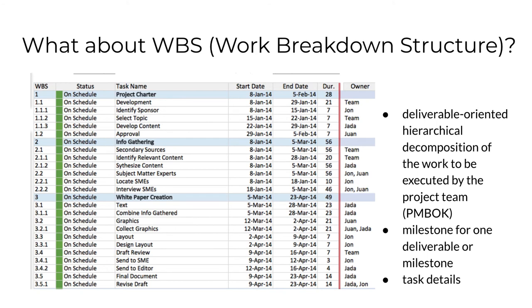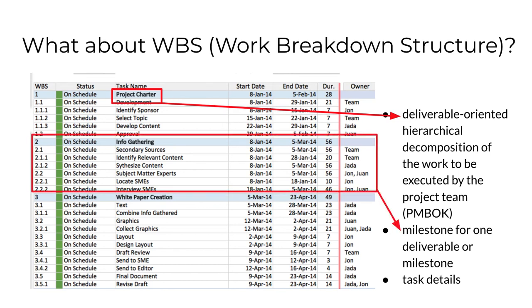It's also important to know what a WBS — Work Breakdown Structure — is all about. It's a common project management technique used primarily within a waterfall method, where every deliverable is known at the beginning of a project. A spreadsheet lists project deliverables such as a project charter, info gathering, and white paper creation. The deliverable 'info gathering' is decomposed into a hierarchy of tasks making up one work package or milestone. Each individual task includes start and end dates, expected duration, and the individual who owns that task. For large, complex projects with many team members, a WBS can be incredibly valuable, though it requires a lot of upfront planning.